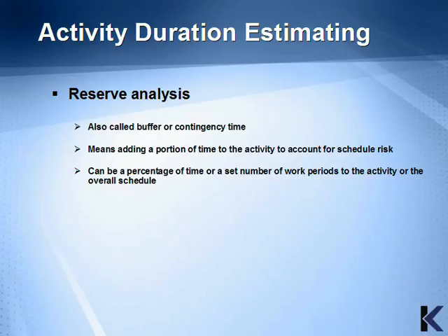Reserve analysis is also called buffer or contingency time. It means adding a portion of time to the activity to account for schedule risk. It can be a percentage of time or a set number of work periods to the activity or the overall schedule.